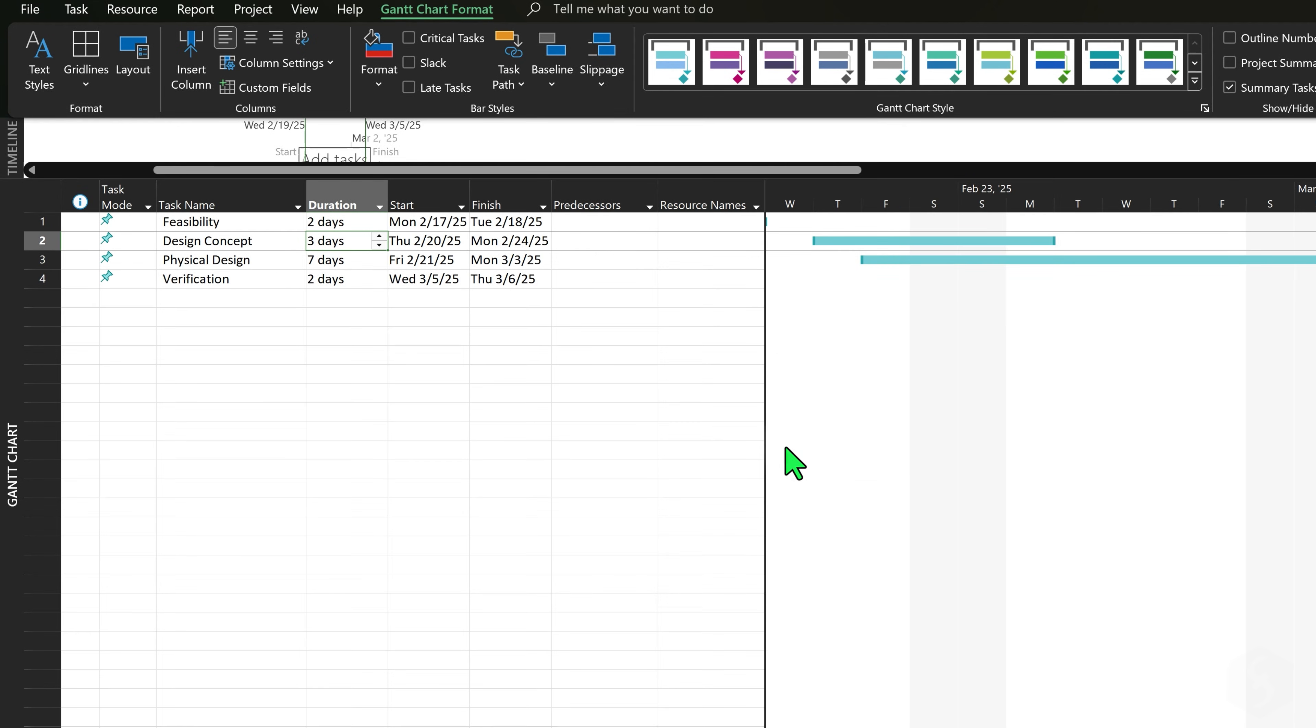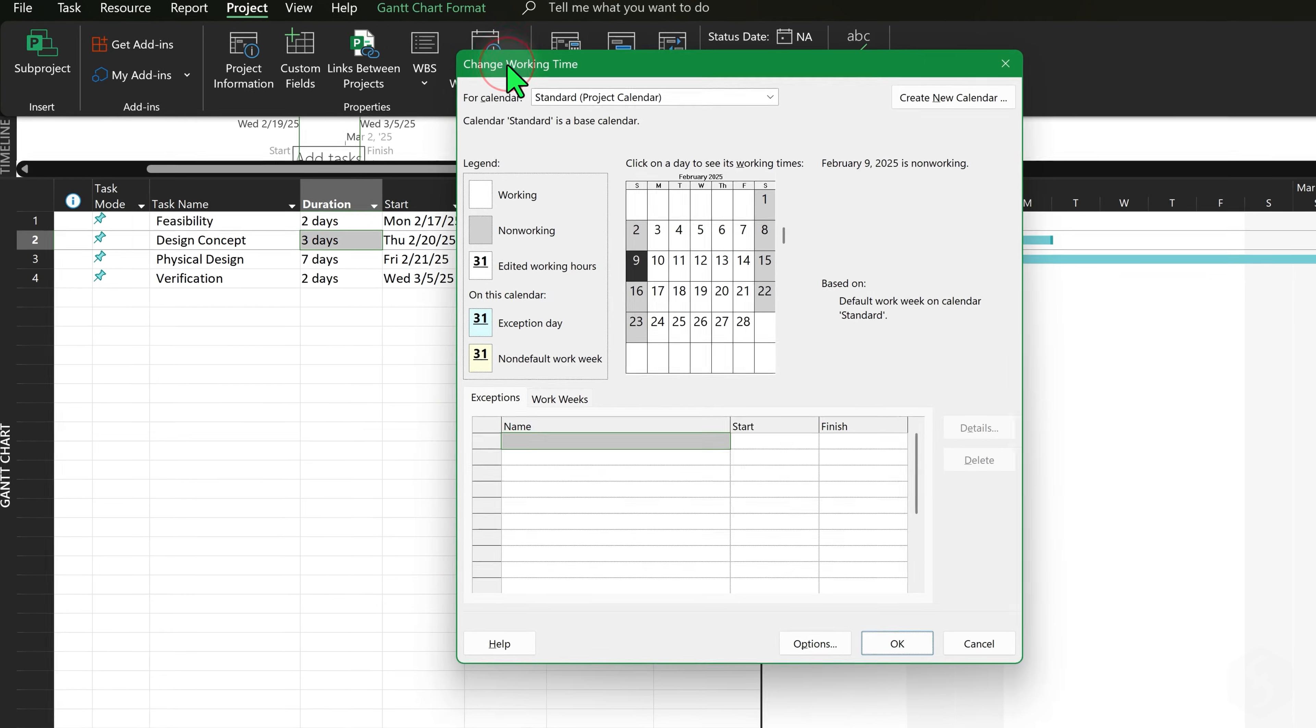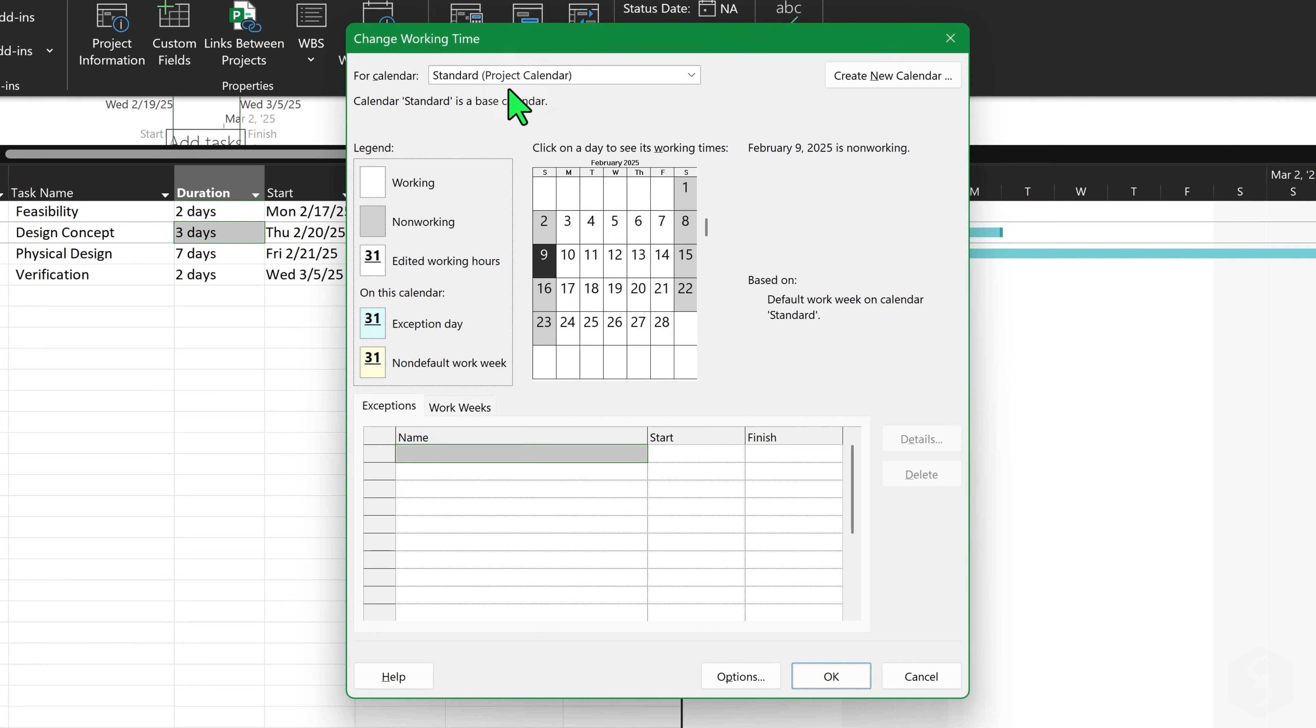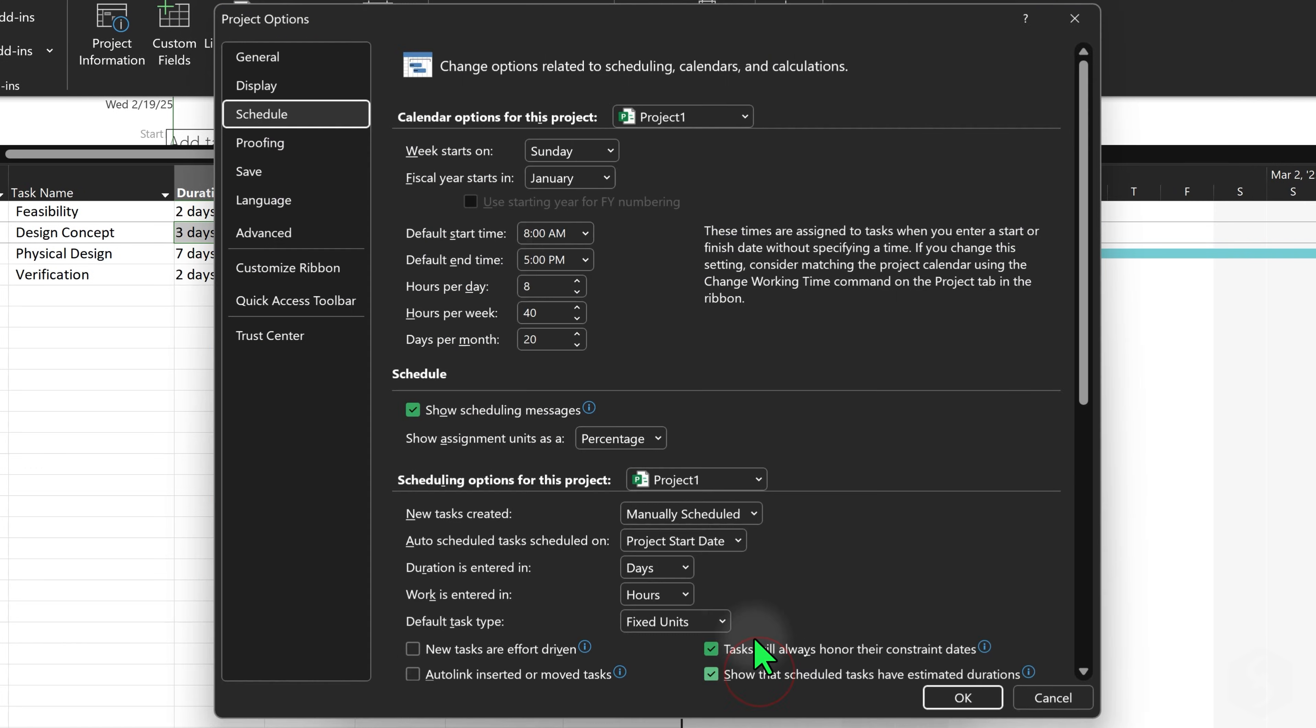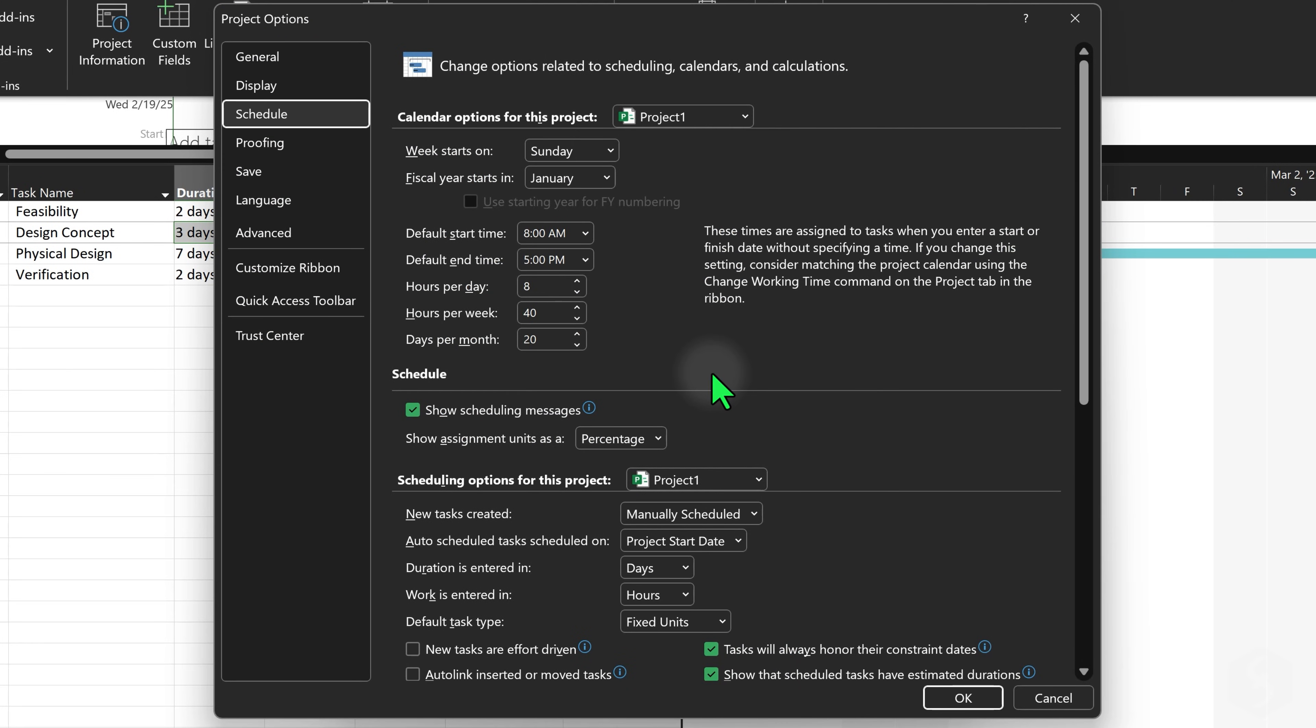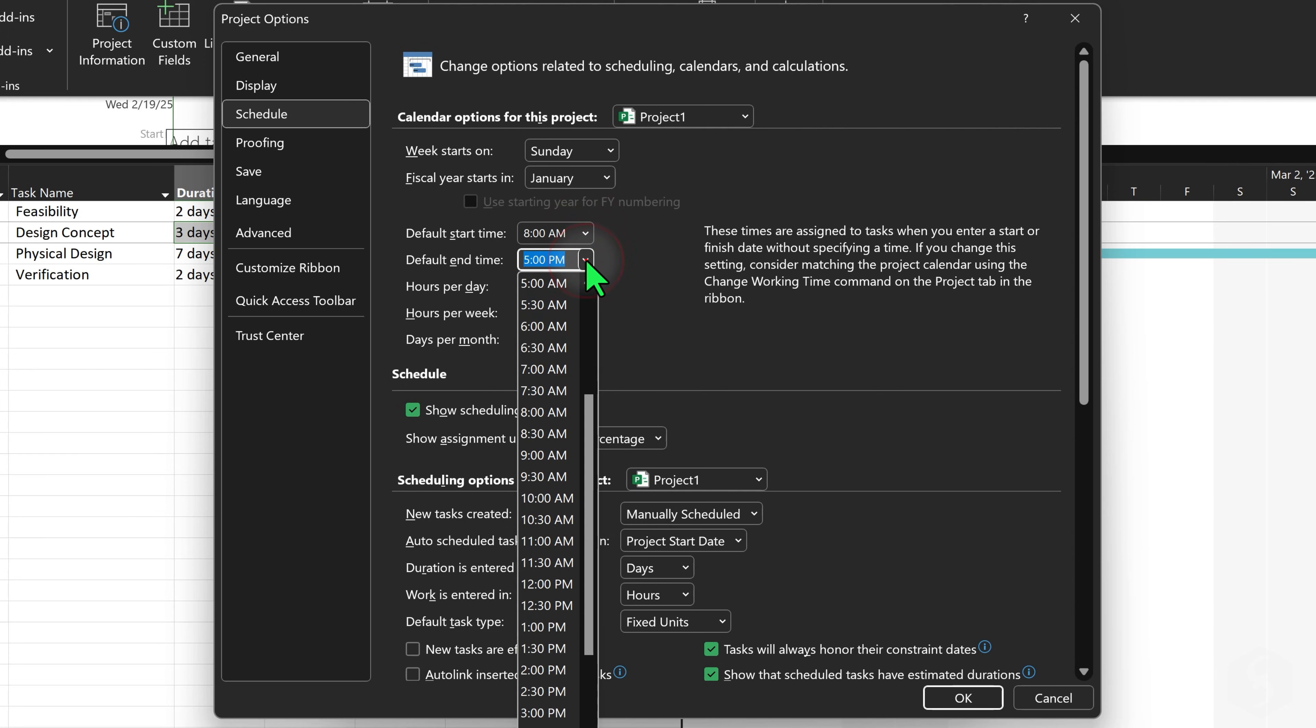To customize working days and holidays go to the Project tab and select Change Working Time. At the bottom click Options to define the default project rules, such as when the week starts, the start and end times for the tasks and the number of working hours per day and per week.